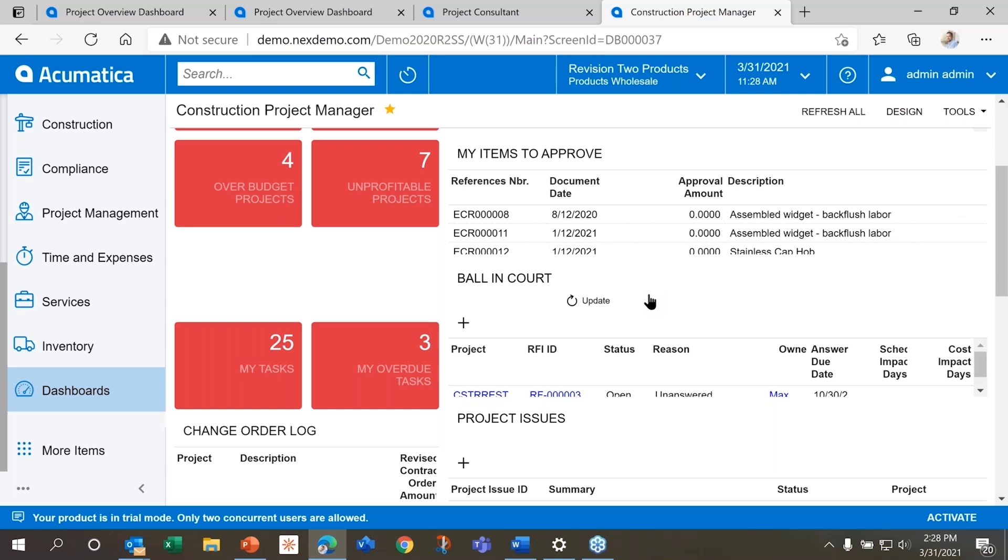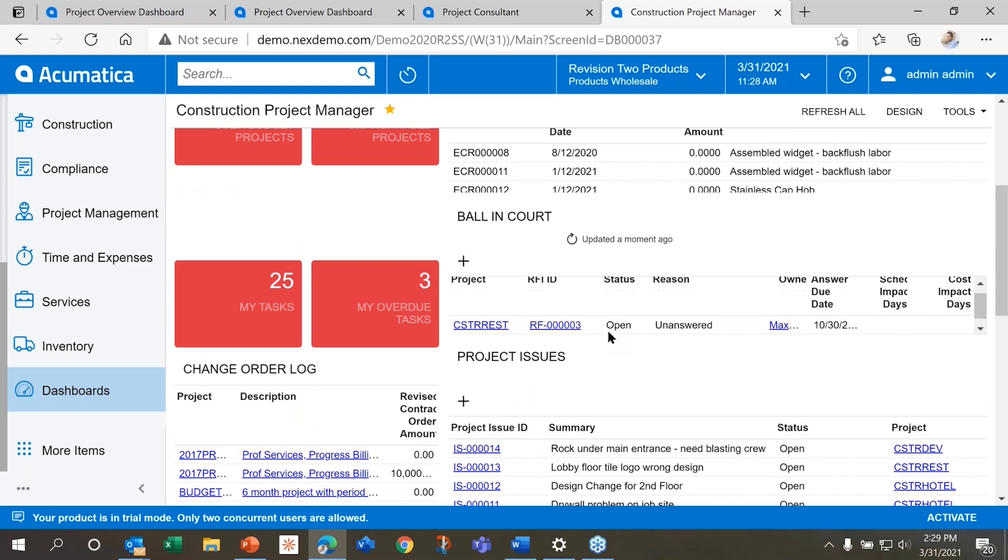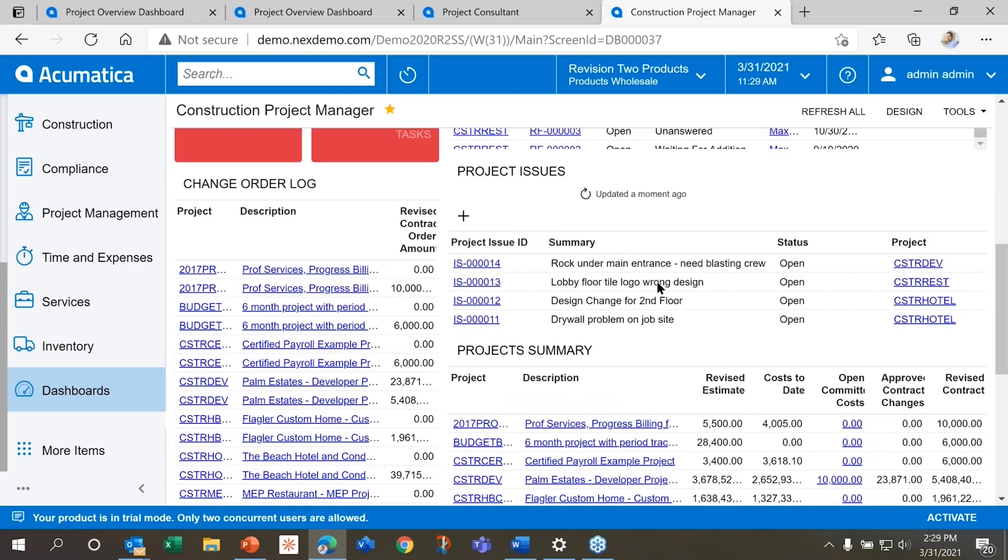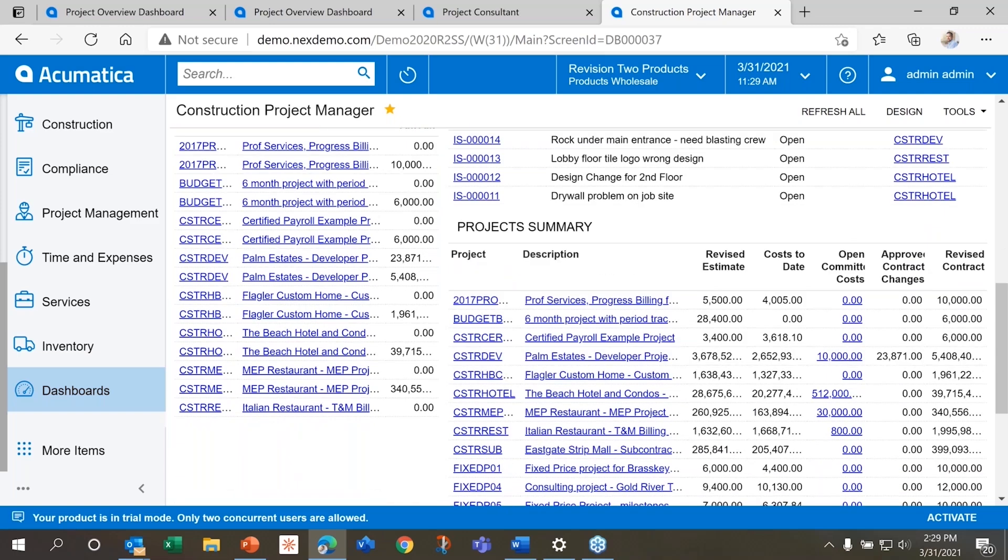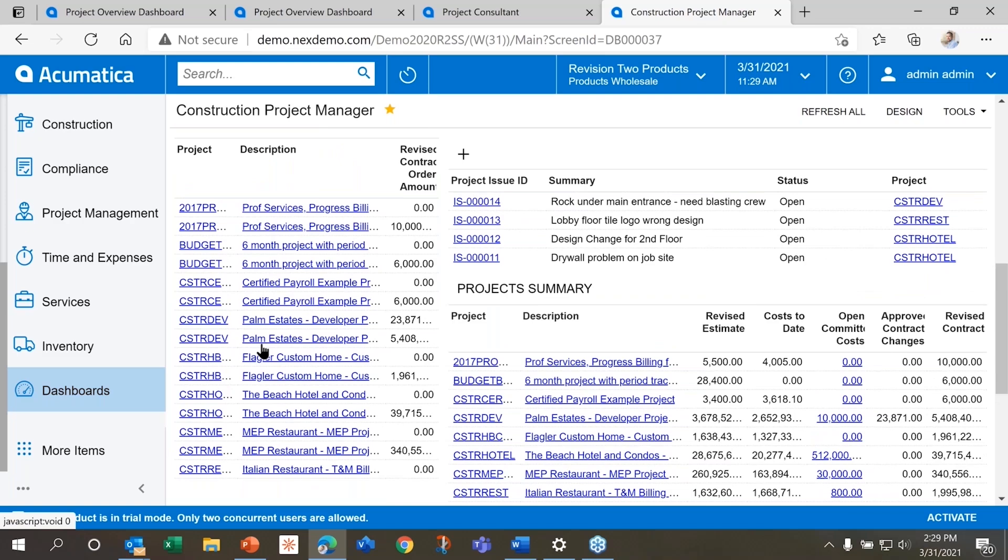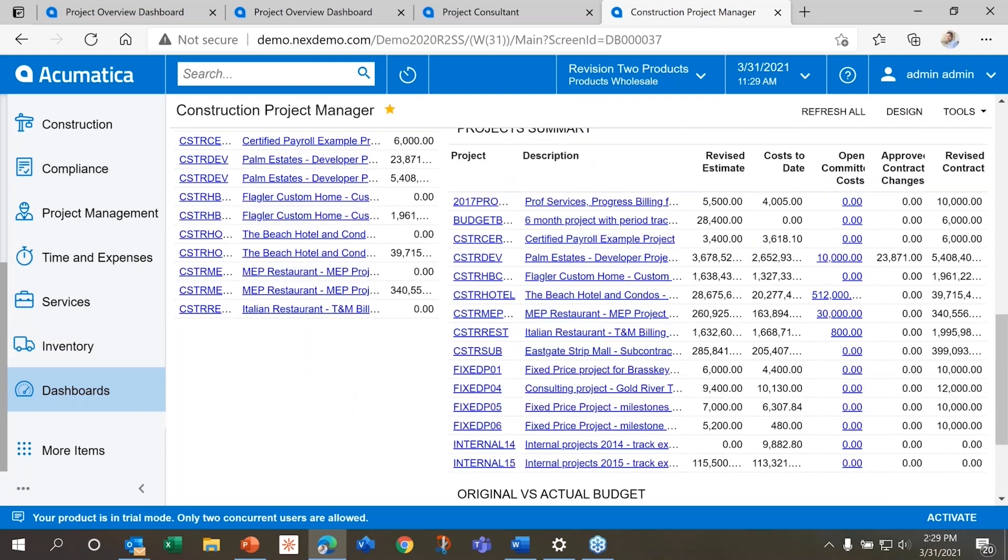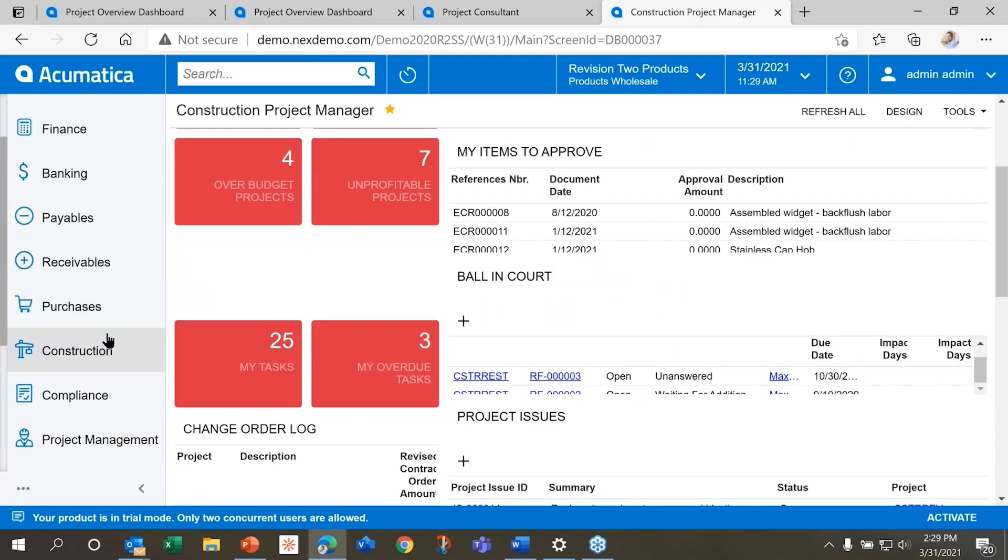I have items to approve. So these can be items that are fixes. In this case, we have a back flush labor, we have a stainless steel piece that needs to be ordered. Maybe it's a problem at a site. Project issues list, right? We have the wrong lobby tile put in the floor, we need to fix that. So we're creating kind of a case, if you will, a project issue that can be managed and assigned by a project manager and anybody on the team that they will get the notification for to be able to go in and look at that. I can come and look at all my change order log and see where I am, where they're approved, where they're not approved. These dashboards give you the ability to do a lot of that view in one place instead of having to go click like a lot of applications into those areas. So again, that one stop shop between my dashboard and my construction workspace.